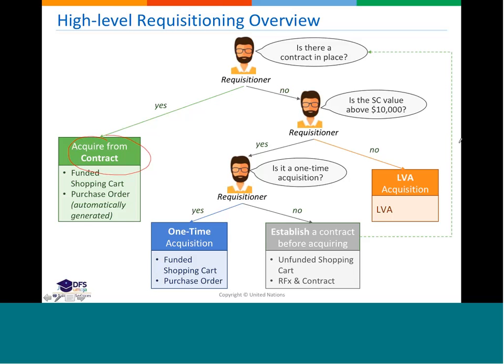You will have a lot of materials coming from a system contract, but not all the materials are going to be used in the same project. If you have 2 or 3 projects, every time you issue them from the inventory, you will specify what materials are going to be charged against your project. So it's easy to use one system contract for different projects because it will be one by one.